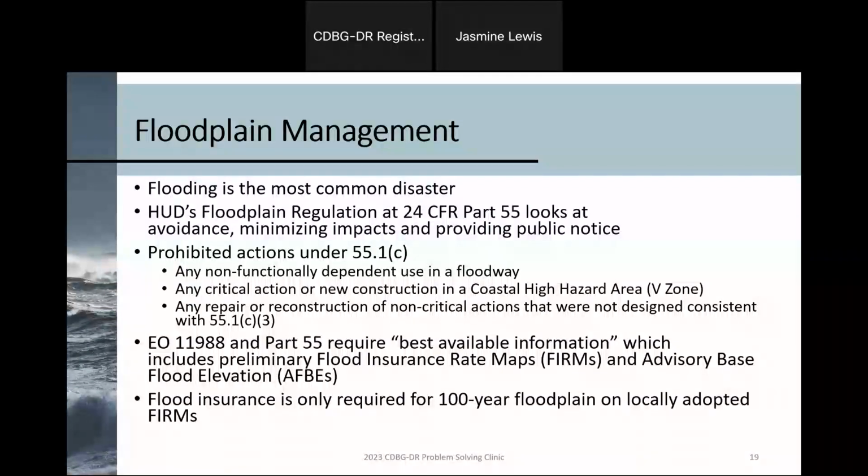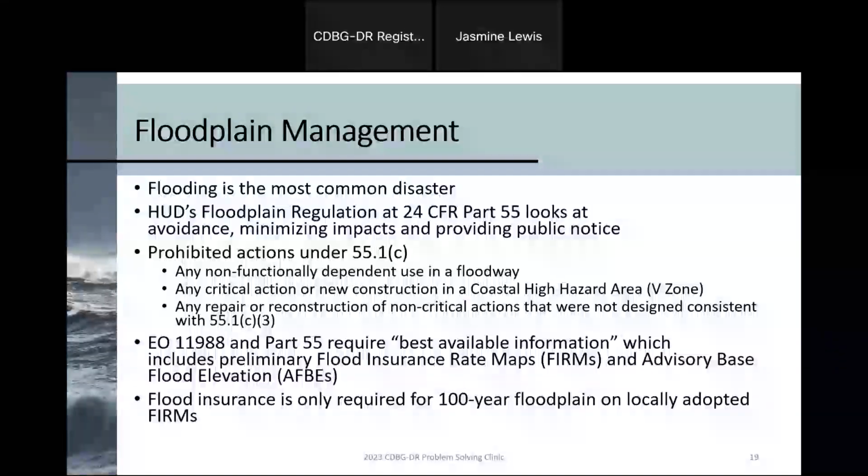However, if you have something that's more confined, you typically can knock out more of the laws and authorities, which allows you to really expedite the process there. So it's a fine line of trying to hone in to an appropriate area, which will dictate how fast you can actually complete the tier 2. One of the great options, if you have a rehab program that you're starting, is that while you're doing that, you can go ahead and establish your tiered environmental review.